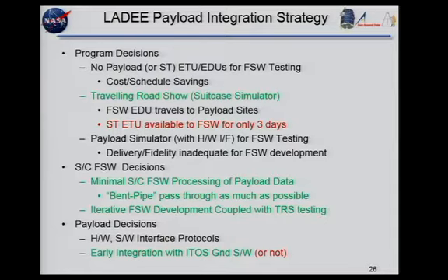And this kind of goes back to what Bon was saying, that these payload instruments are going to change because they're doing stuff sometimes that's never been done before. Some cases they've done a lot of these things so they can have a good idea, but like the laser comm, they hadn't done something like this. It's going to change. So we decided to not require the requirements to be written in stone right away.